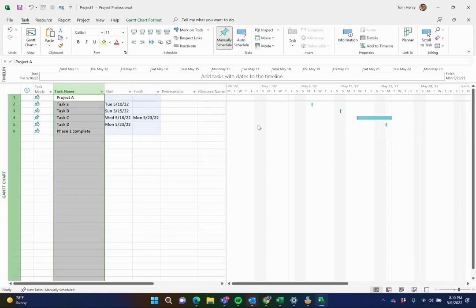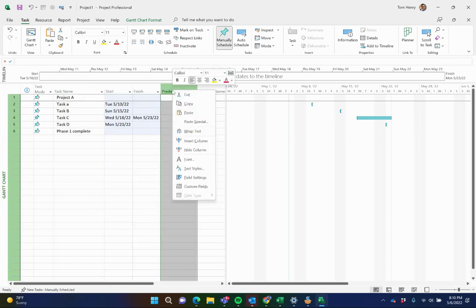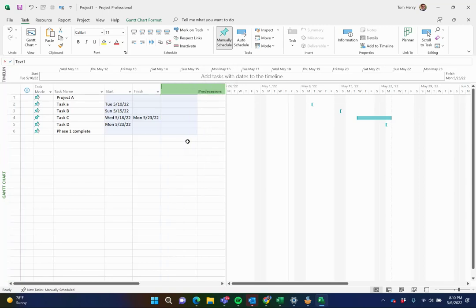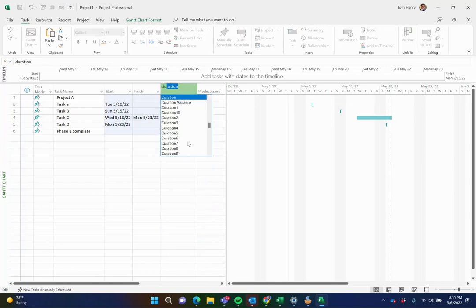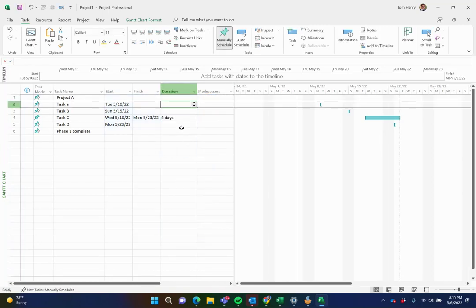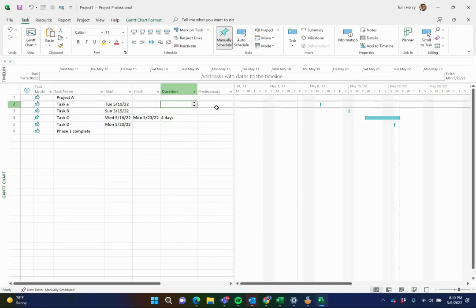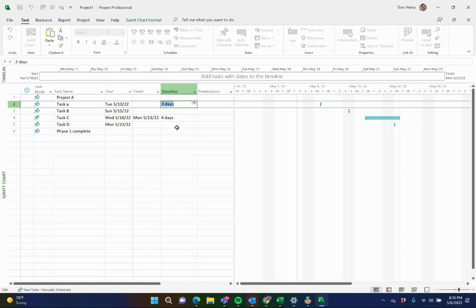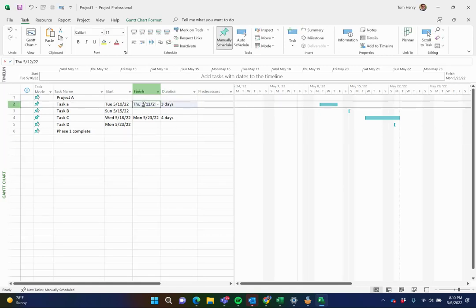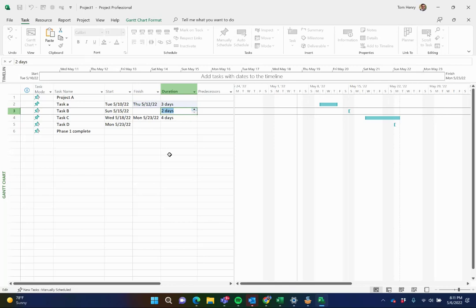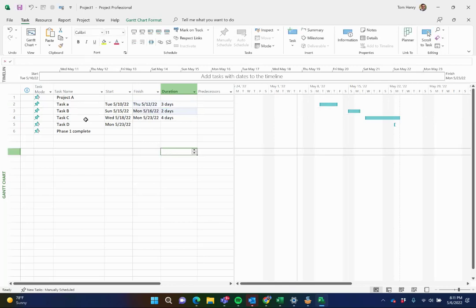The nice thing is it's managing these things for us. We know the task name. Also, we've got all these other columns that we can do. It's building out a Gantt chart for us by default. I can now, if I want, put in my duration column. I deleted it. Now it's back and it's calculating these things for us as opposed to us having to manually put in a formula or anything like that. So if I say that this one starts on this date and it goes on for three days, boom, it's calculating the finish date. Again, if I say this one's three days.